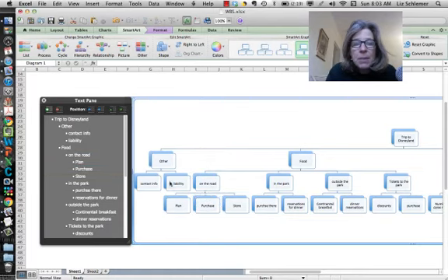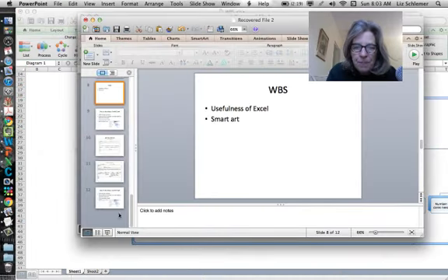And what happens is that each of them, once I go down farther, so like food, I broke it down to on the road, in the park, outside the park, tickets to the park. And then on the road, I broke it down into plan, purchase, and store. So each of these can then be assigned to one person. So I'm going to particularly look at this item of store when I go back to PowerPoint.